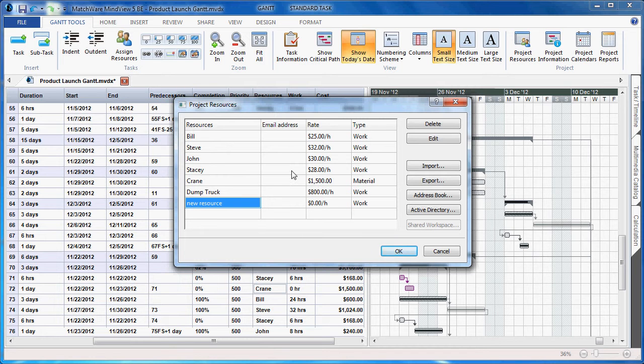MindView now associates the ability to add a rate. The rate can be done per hour for the user or resource.